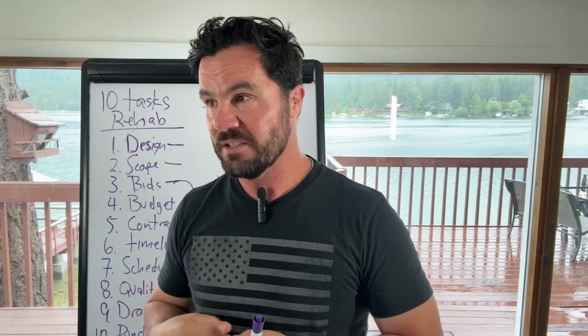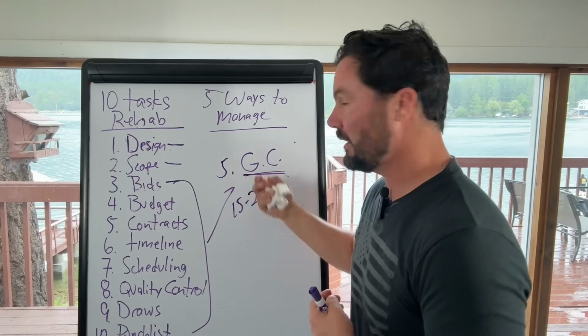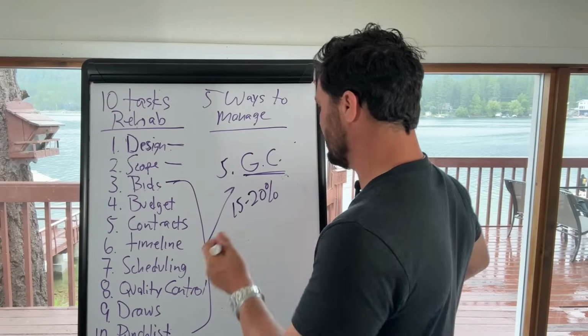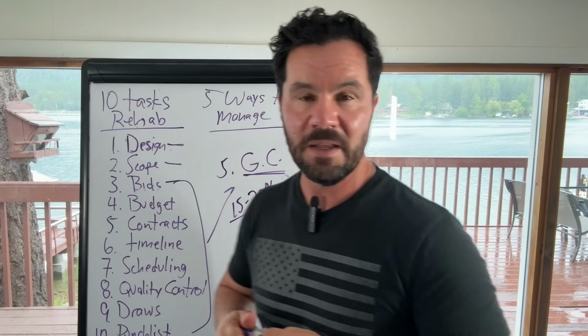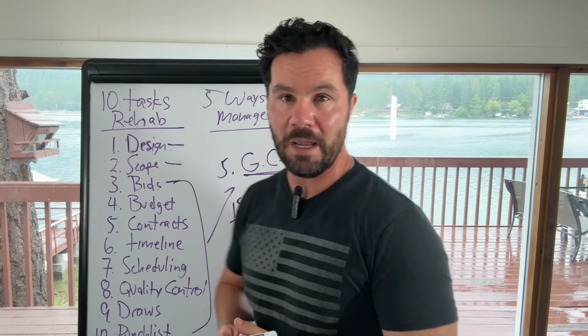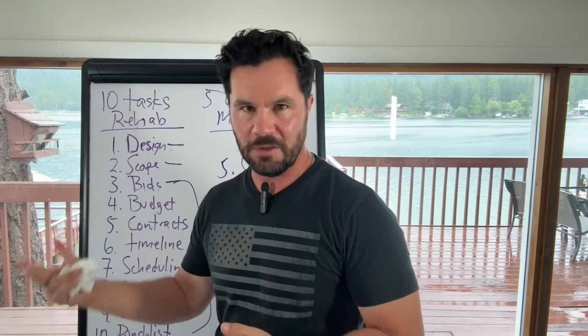When I'm doing rehabs in markets that I'm not established, I'm not doing volume in a market. Like, let's say I do a one-off rehab in a specific market, I typically will hire a GC. They have all the contacts, they have all the subcontractors, they're there, they're on the ground. And then I budget that higher price to get my rehab done. And now I just have to manage that GC. So this is a very effective way until you're scaling in a specific market and can go to the foreman.